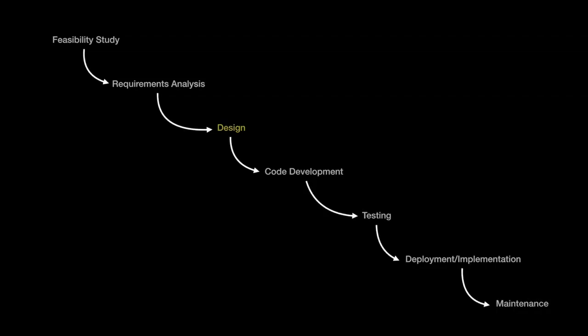Let's imagine that something goes wrong in the design stage. A technical architect leaves and doesn't arrange enough cover for the work that they're in the middle of. In that case, their design phase won't produce the correct deliverables for the code development phase which follows it. So they're going to be missing some designs that they were meant to get. And this could hinder the code development phase. They may not know then how to build that part of the system, or they may then need to rework it. So deliverables are critical.